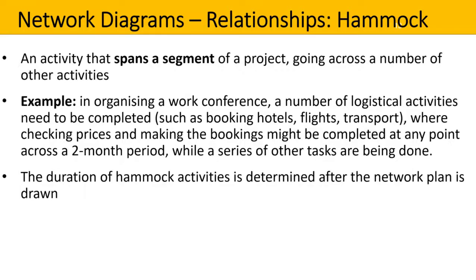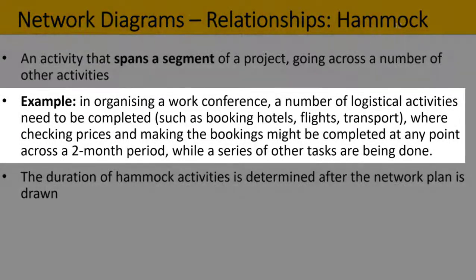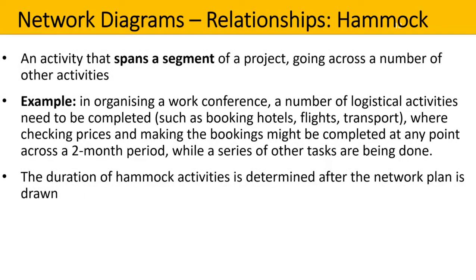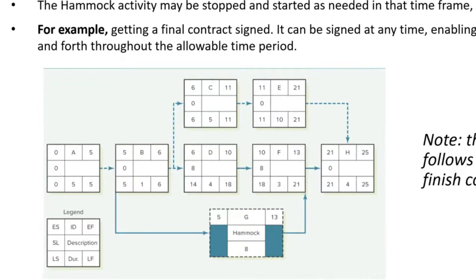Here is another type of relationship called a hammock. This is an activity that spans a segment of the project, going across a number of other activities. For example, in organising a work conference, a number of logistical activities need to be completed, such as booking hotels, flights and transport, where checking prices and making the bookings might be completed at any point across a two-month period while a series of other tasks are being done. The duration of hammock activities is determined after the network plan is drawn. The hammock activity G needs to be done between week 5 and week 13, and it's tied to activities B, D and F.